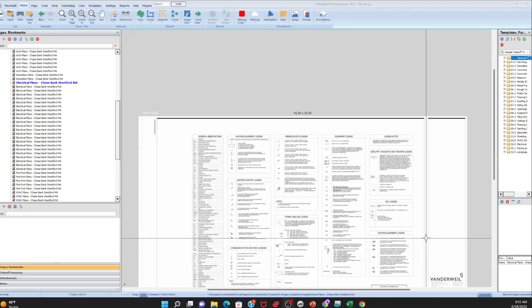So when it comes to the electrical set, if it's from the ground up, give yourself 2, 3, 4 days, because you want to look at it first, go through the hardest parts first, and then put it all together.